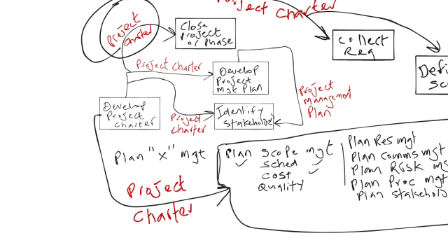See? So this is the very beginnings of what I call the PMBOK guide mainline. If you can understand, my project charter comes out and it goes to develop project management plan, identify stakeholders, all of the Plan X management processes, and the first 3 processes of scope. Hey, I just dropped some gold for you there. The first 3 processes of scope also need the project charter.